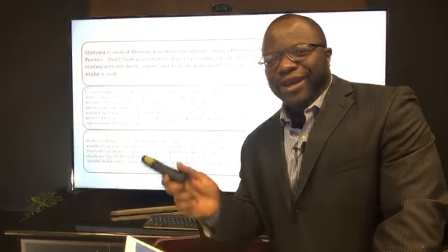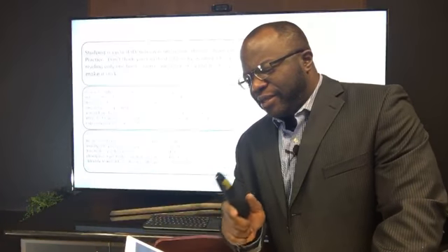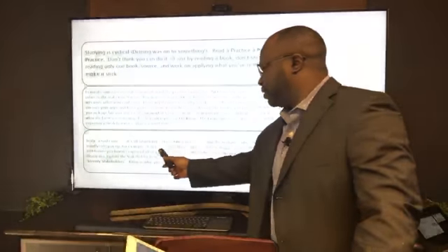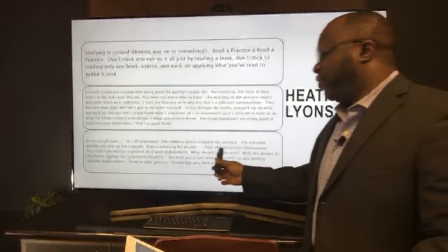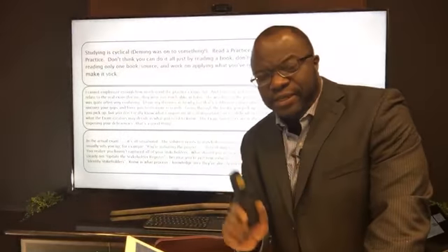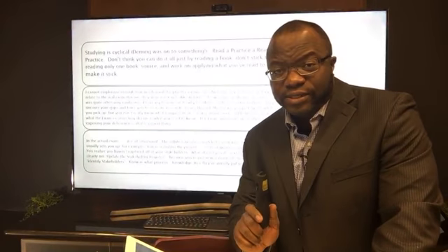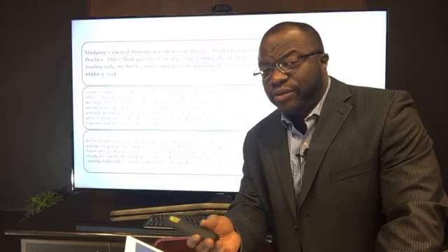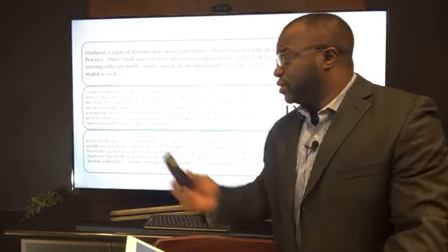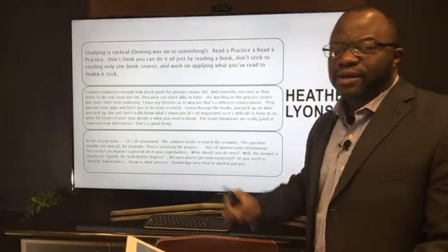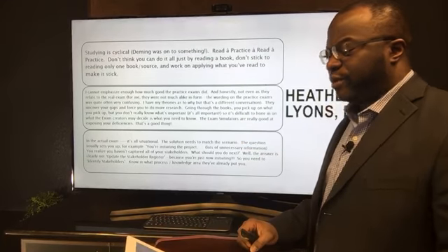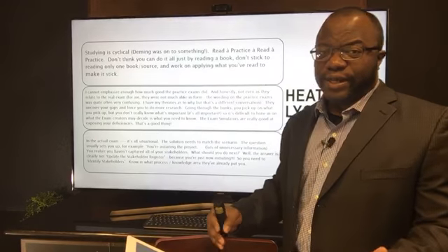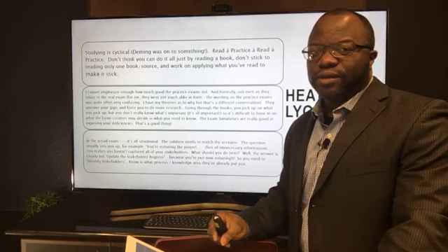And this is why when Heather sent this to me, I said, Heather, you would be a good trainer, because there's a lot of subtlety here. I don't know if you caught the difference between update the stakeholder register versus identify stakeholders. If you've not identified stakeholders, you've got no register to update. So this is a clear example of the subtle trickery: the difference between update a stakeholder register versus identify stakeholders to create a stakeholder register.